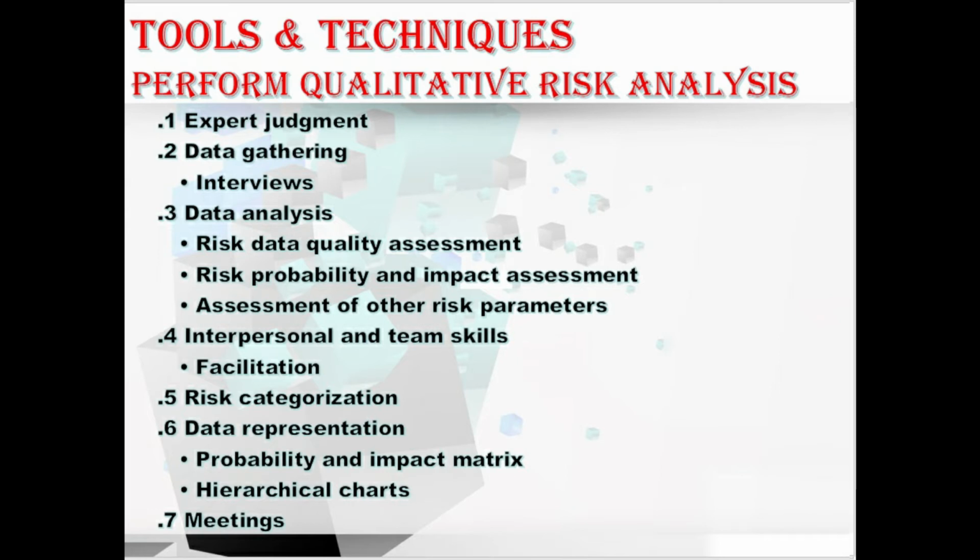Let's move to the next technique, data gathering techniques, which includes the interviews. In these interviews, structured or semi-structured interviews can be used to assess the probability and impact of the individual project risk as well as other factors. Hope you understood this interviews technique. Let's move to the next technique.